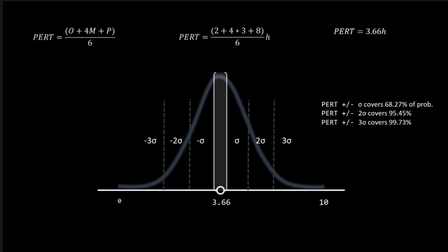See, each sigma pushes the range of the estimate further, to the point where it becomes meaningless. The more sigmas we add to PERT, the closer the range will go from 0 to infinite. So we could say that every task will take between 0 and infinite effort, but that will help nobody. Hence, in most, if not all cases, a single sigma will provide enough certainty.